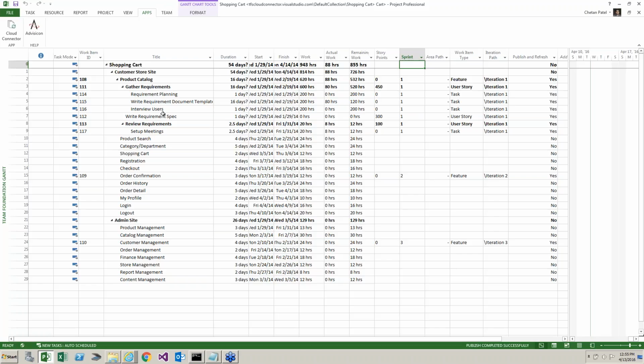Will this work with Project Online timesheets? So timesheeting, that's always an interesting animal because not every organization uses the Project Online functionality. But inherently the idea is that when we sat down and thought about this, we certainly could try and push and pull data to the timesheet mechanism, but if you think about how it works, if Chayton goes in Visual Studio and a team member says, hey, look, I've got, if you can see on his screen there, he's showing 80 hours of actual work on row 5, and they change or tweak or tune this, Project doesn't even need you to tell how many remaining hours.